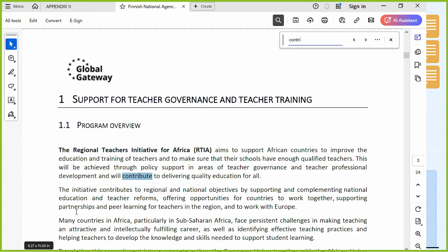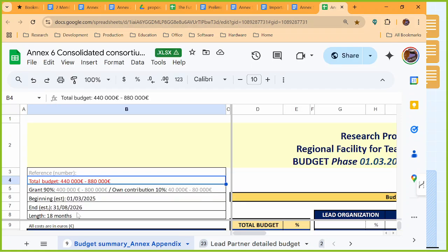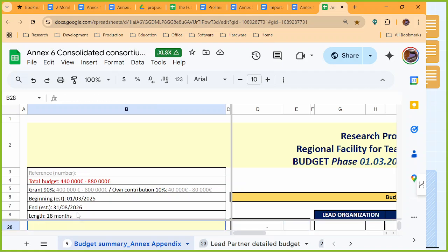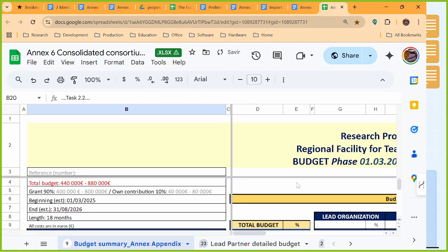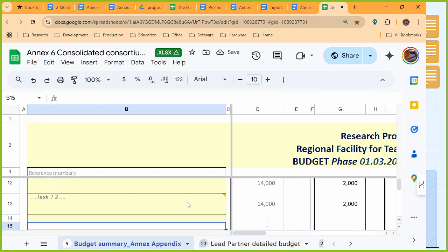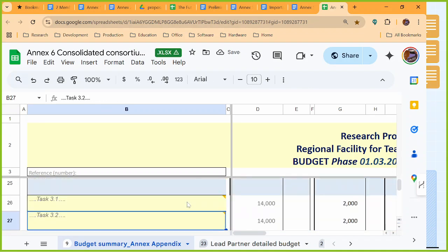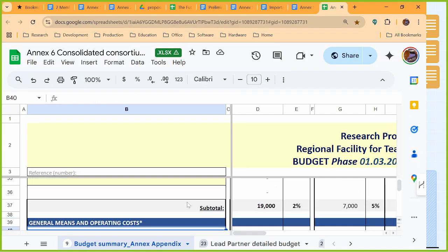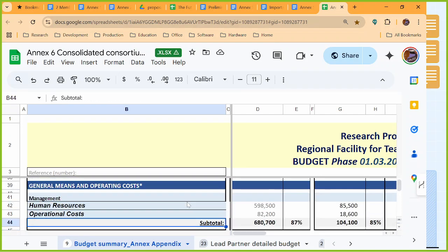So that's why it's normally easier to calculate the budgets by institutions according to the personnel hours. So you have, for instance, the head technical personnel hours, and the amount differs from the research assistants or something like that. So I like that because there's a human resource component here, and we can account for it in the budget. If we're saying there's a 10% contribution, it's actually coming through the human resource component.